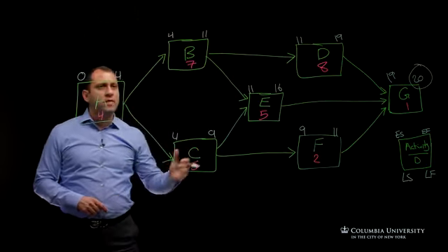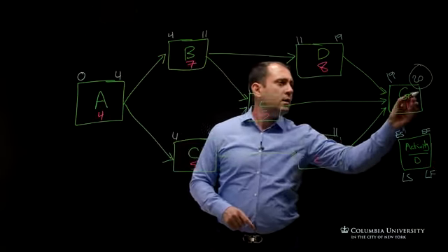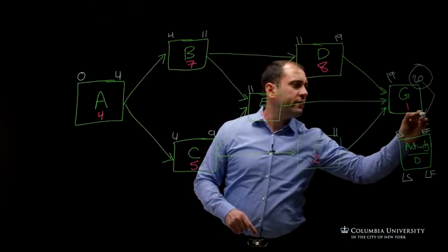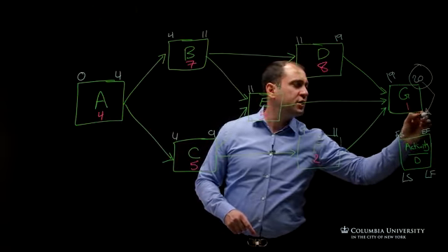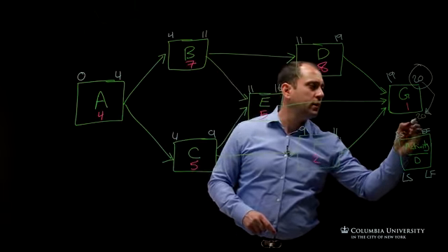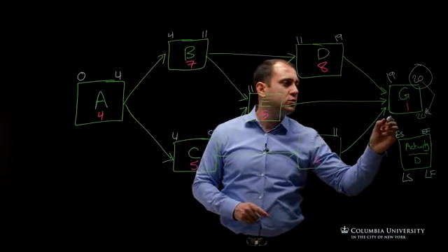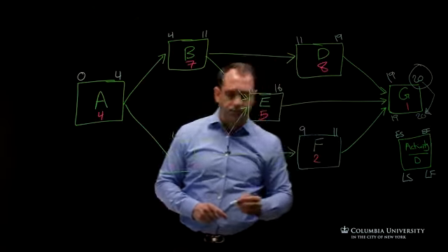So let's go to the backward pass calculations. As we mentioned, this is the only number we get from the forward pass calculations and the only connection we have with it. So we have 20, and you do the same calculations but backward. 20 minus 1, 19.